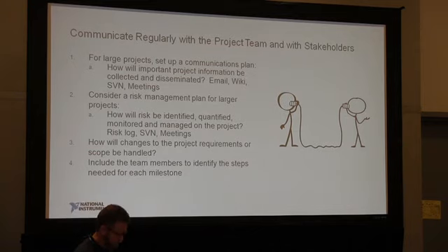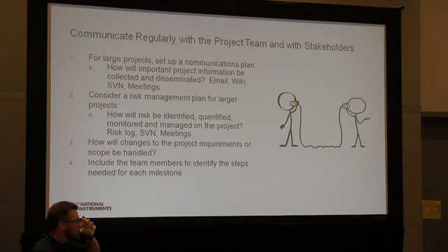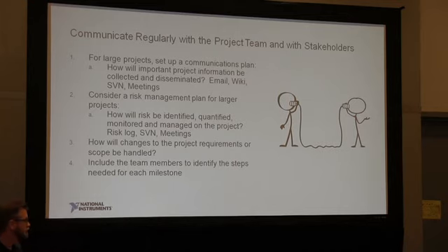Project management experts recommend that you communicate these different areas, information about project status, work status, tasks achieved, upcoming tasks, obstacles, any areas of risk, on a weekly basis. So you don't want to go a month and then find out, oh, we're almost out of money, or we've got big problems implementing a certain technical solution. And you want to keep all the team members in the loop on these communications. That's why we do the weekly team meetings to help with the big projects, keep everybody in the loop of what's coming up next and who's responsible for which piece.